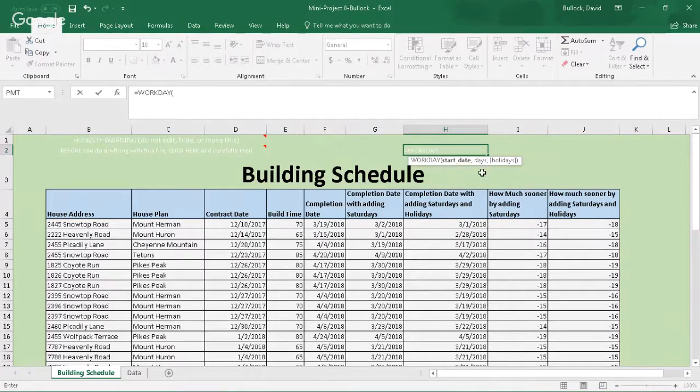So yeah, you could just make sure you picked out the workday. And you just have to make sure you put your holidays in there as well. I ignored the holidays because that's what it did in the video. But you're supposed to put in the holidays because you obviously wouldn't be working on holidays if you're just doing normal workdays.